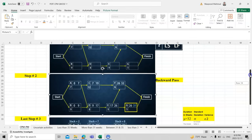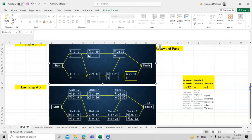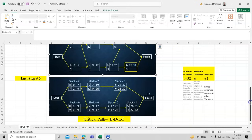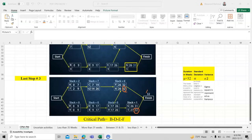Now we do the backward pass. The total project duration is 32, since the last task gives 32 and G gives 31 — we choose the largest, which is 32. This value is referred to as mu (μ), a Greek letter. From mu = 32, we compute: LF for G = 32, LS for G = 32 − 5 = 27; LF for F = 32, LS for F = 32 − 6 = 26.